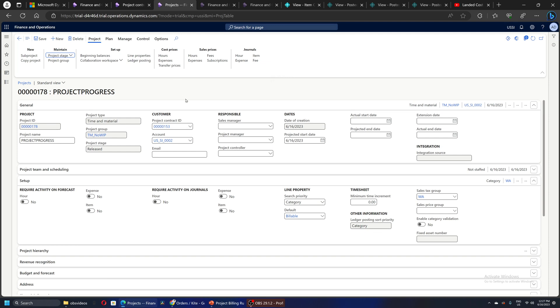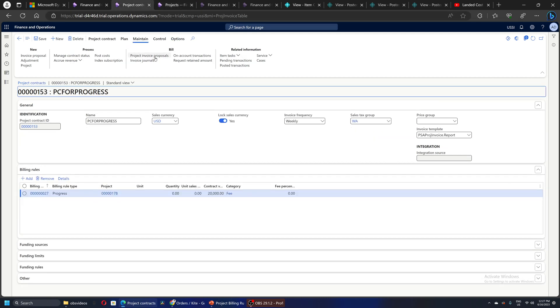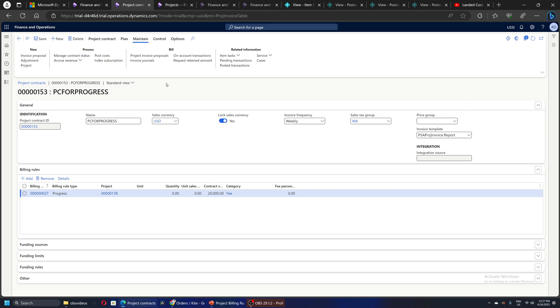Let's say after some time, some work has been done on the project. I've discussed with the customer, and let's say we've agreed that 20 percent of the work is completed and I can do an invoice for 20 percent. So I will go to the project contract, on the Maintain tab there is Process, and there is Manage Contract Status.